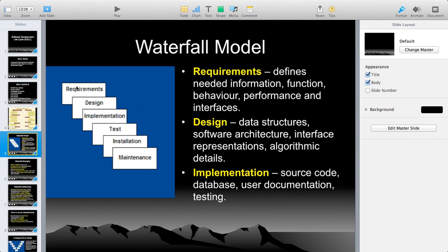Because once business analysts gather the requirements and once the designers start designing the project, if the client wants to change any requirements, it is not possible. So whatever changes you want to do, you do at the requirement stage only. Once the designers start designing or developers start writing the code, it is not possible in this model for the client to modify or change the requirements in the middle of the process. That is the reason we call it the waterfall model.